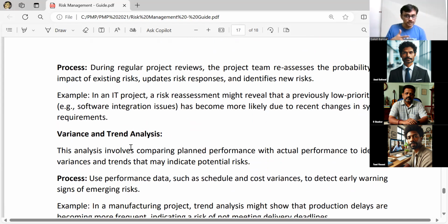So in my weekly status report, I need to talk about the top 2 risks. Yeah, that's the expectation from management. Now, before I talk about the 2 risks, I will open my risk register and see if there is any risk which is already closed. I will close them.